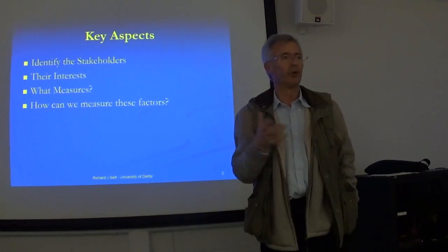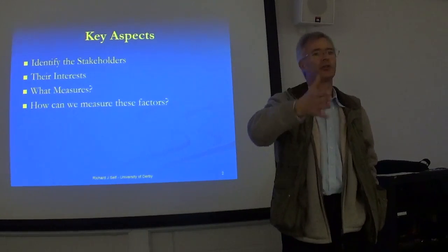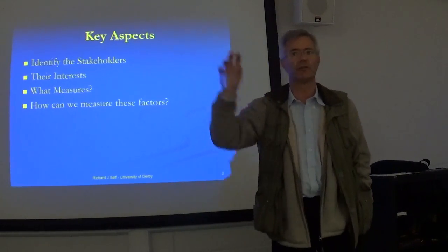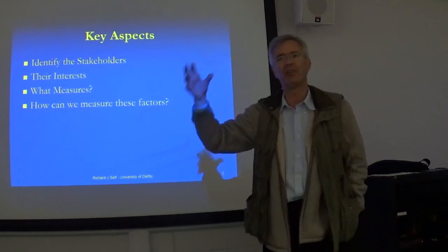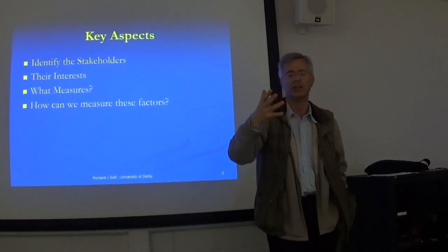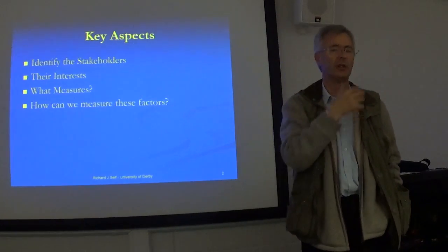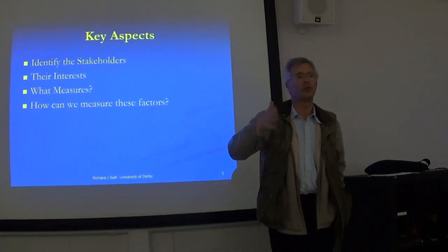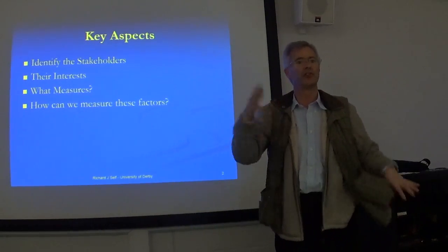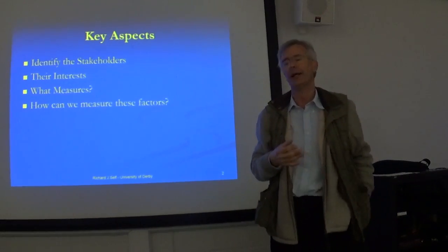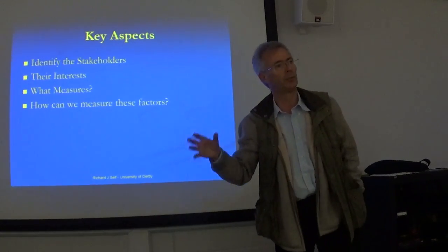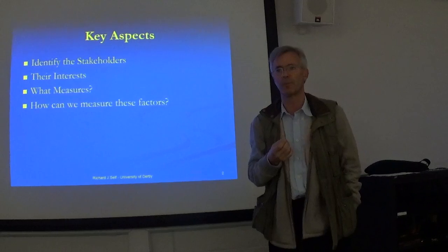One of the really big problems is then being able to do the last user acceptance test level, in the UAT environment, before you finally release it, is having an adequate amount of data and an adequate, representative size of processing and data storage and so on. Because if you do your user acceptance testing, your load testing, in a baby environment with one server and a few people using it and a small sample of representative data, things will probably work with reasonably good performance.